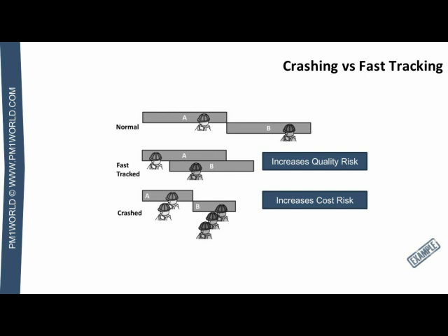Resources are not free. It could bring additional resources. Resources could be equipment, not just people. Or you can pay to expedite the delivery of things that are sitting on the critical path. Crashing, though, only works, of course, on activities that are on the critical path, where adding resources would shorten duration.